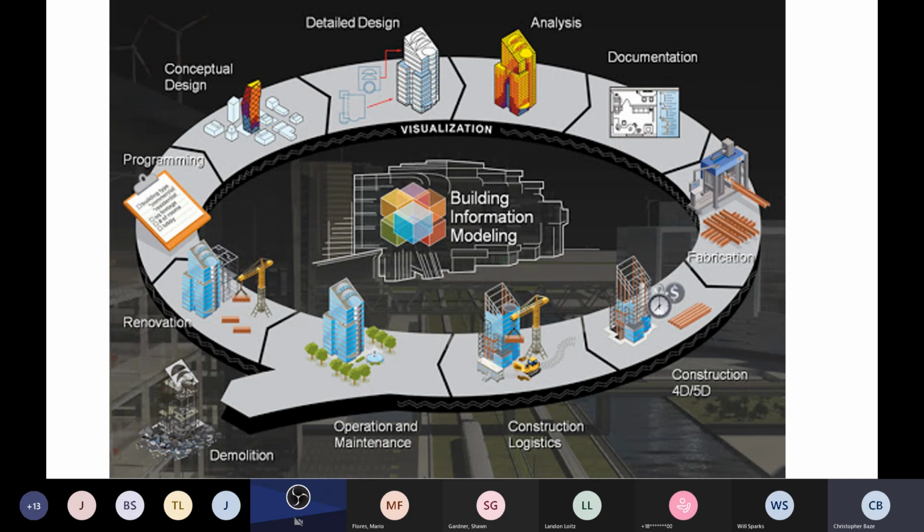Absolutely, and I think some of this technology is starting to. Oracle uses the term datafy, where they take experience, like a good PM will know how long it typically takes for a HECO permit of various sizes of projects. But if you start to save that in a database, you start to see that maybe there's some correlation between the lot size and how long it takes to process the HECO permit, or maybe it's linear, or maybe there's no relevance and it takes roughly the same amount of time every time. I think what we're starting to see is a lot of that experience that traditionally takes 30 plus years to gain. How are you turning that into a database that everyone can take advantage of and look at and start to get insights from historical things that in a lot of cases you don't have control of?